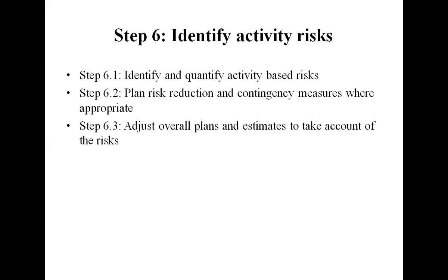So first, reduce where possible. Otherwise, specify a contingency plan. For example, take on a contract temporary developer if a team member becomes unavailable through illness.